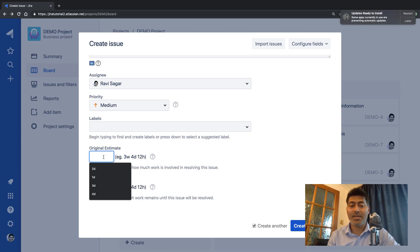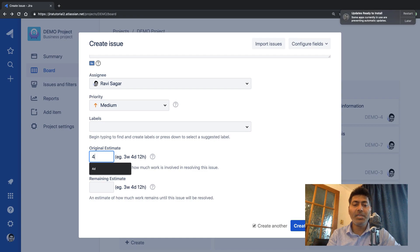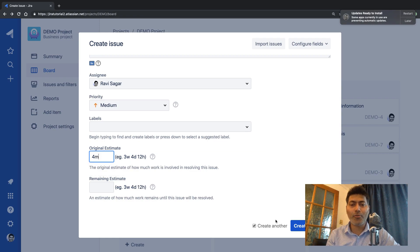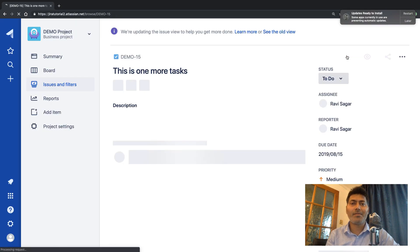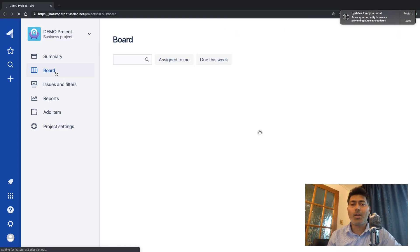For the last issue I'll set the original estimate to four hours. To clarify the time notation: 'm' is minutes, 'h' is hours, 'd' is days, and 'w' is weeks. So entering '4m' would be four minutes — let us change it to four hours instead. Now we have a few issues to work on.